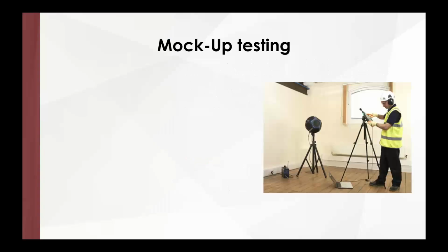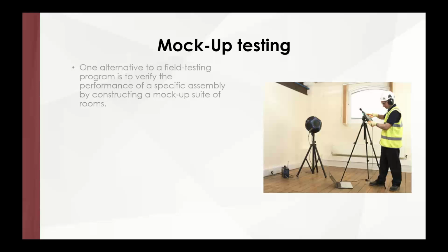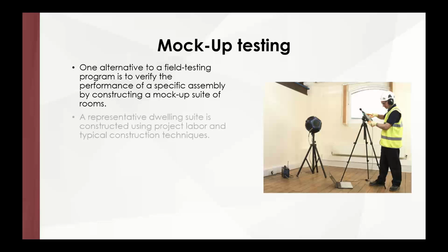One thing I recommend is mock-up testing. I think it's a great way to get everybody on the same page. Of course, you could do field testing, but that's after the fact. I'm a strong believer in mock-up testing. When you test it, make sure the dwelling suite is as identical as possible to what's going on in the job. Use the same labor, the same products, everything.